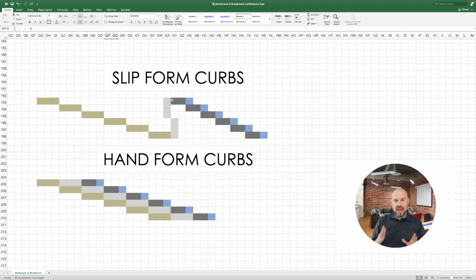With that breakneck, if we fix it, we could gain a lot of time. So how do we fix that? In looking at it, we were talking about, well, could it be a different slip machine, maybe a smaller slip machine, or what could we do there? I forget if it was the superintendent or someone on the call, but they said, well, we could hand form the whole thing with a small crew and probably keep that same duration. We all sat there for a minute and thought, that doesn't sound right. But that could work. And what would that do? We started talking about it, and, yeah, that could work.